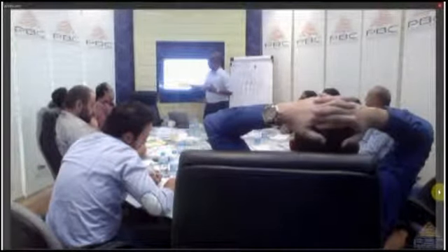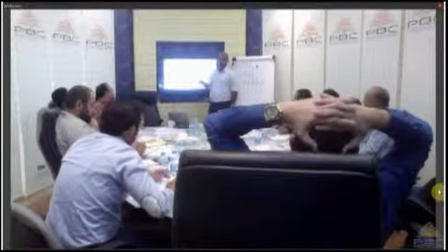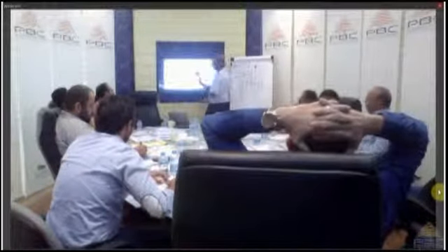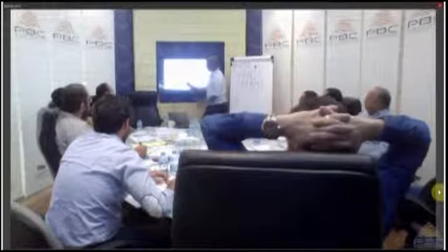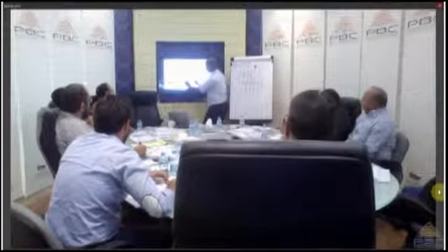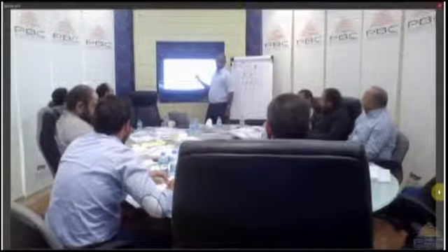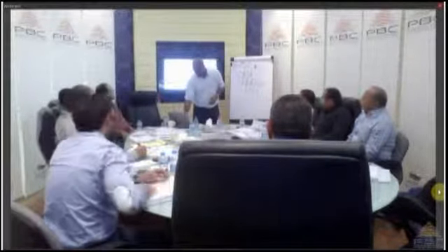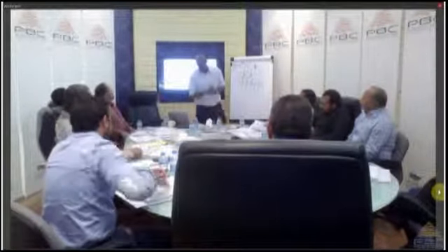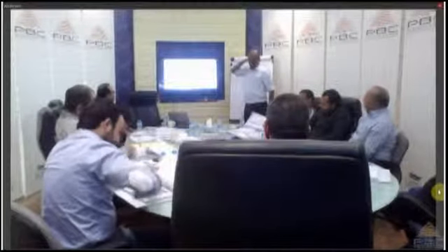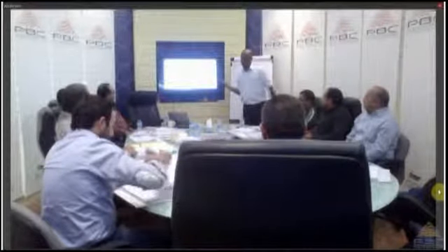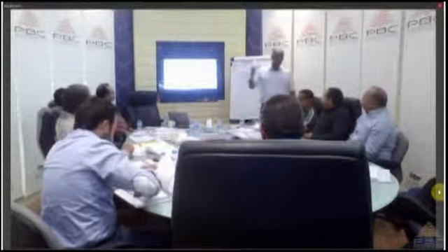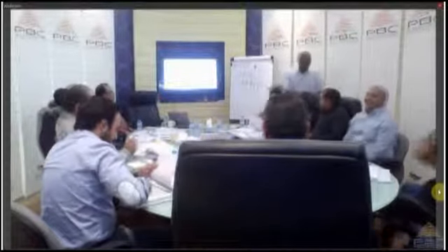And it looks like an S because in most projects this is how cost behaves, right? You have a shooting up of cost during execution or implementation. Right, exactly. And then it levels off. Right, so this is how we work out our S curve. And while you work out the S curve, I will just work out something else.